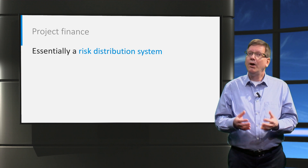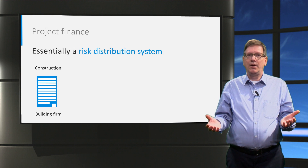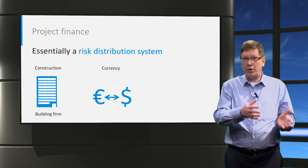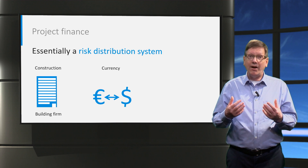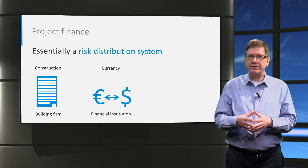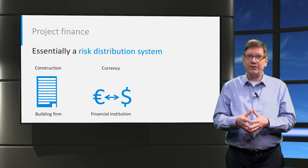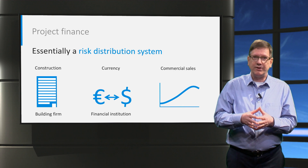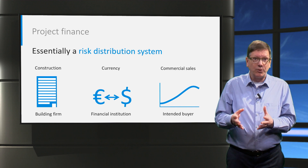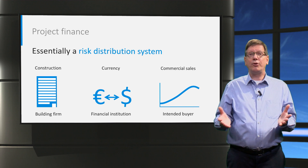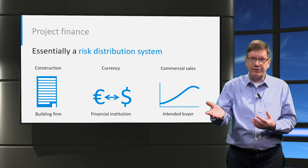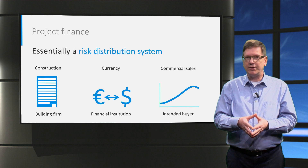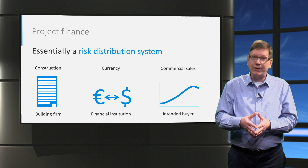Let me give you some examples. For construction risk, that's often a building firm — a financial institution will not be keen to assume such a risk. But for a currency risk, such as the conversion of euros into dollars at an ever-changing exchange rate, a financial institution will be better placed to assess and assume this risk for a price, because currencies are part of their core business. A third example: for the sales risk — being able to sell a product or service produced by the project — often the intended buyer will know best how to manage that. If the project company builds a power plant, the sales risk of electricity is best assessed by a power utility company. We can try to allocate that risk to that utility through a so-called power purchase agreement, or PPA — and we'll see later that that is exactly what happens in such situations.